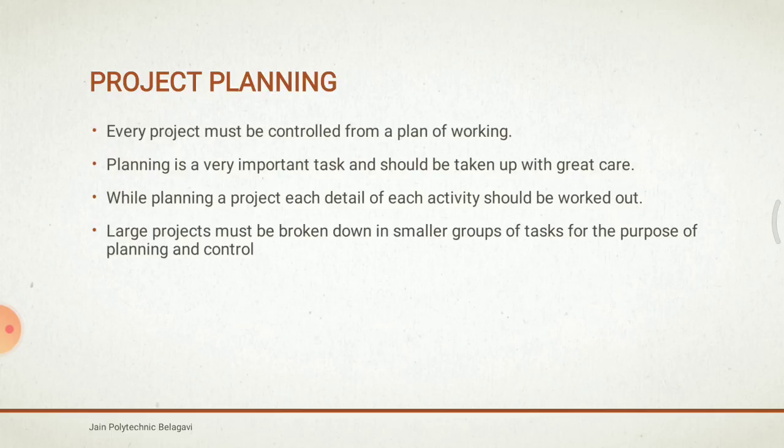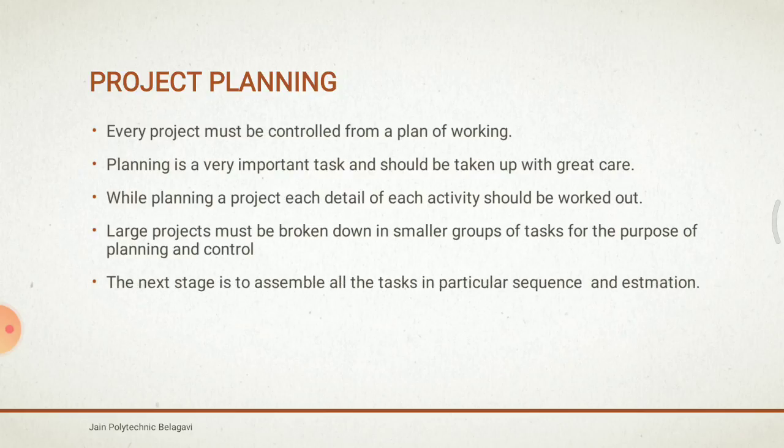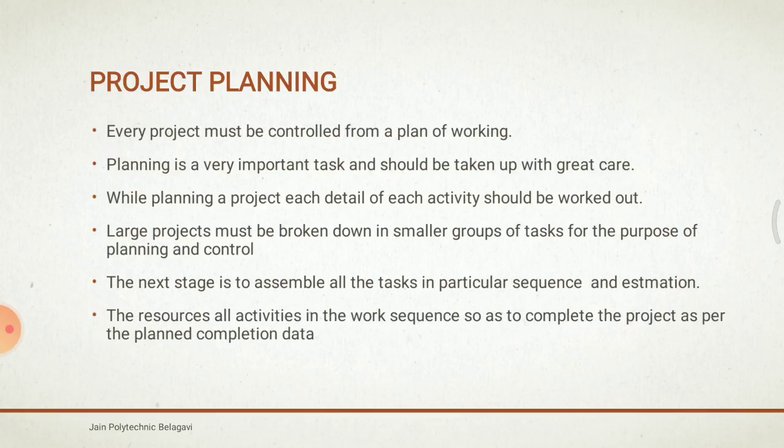A large project must be broken down into smaller groups of tasks for the purpose of planning and control. The next stage is to assemble all the tasks in a particular working sequence, and to estimate the duration and resources for all the activities in the work sequence, so as to complete the project as per the planned completion date.